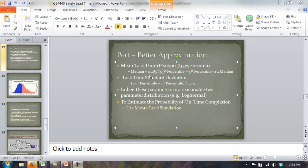The formula for the mean task time has the interesting property that you begin with the median. The mean will equal the median if the distribution is not skewed — if it's symmetrical, the median will equal the mean. Then we adjust for the skewness of the distribution with a small factor of about 0.185, which can be positive or negative based on whether the sum of the maximum and minimum is greater than or less than two times the median value. That gives our estimate of mean task time, which may be bigger or smaller than the PERT estimates.